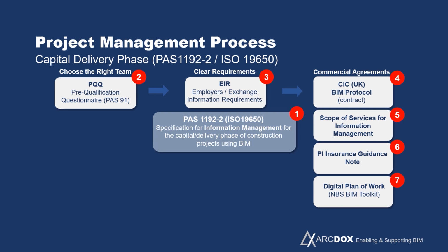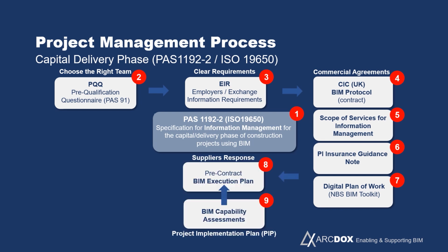And very importantly there, the digital building must be constructed before the physical building, so that you can test and resolve issues within this digital environment before you try and execute that work on site. Okay. In the UK, the government paid the National Building Specification to develop a free online tool to put these plans of work together, which people are welcome to use, or you can use Excel or other tools, whatever you like.